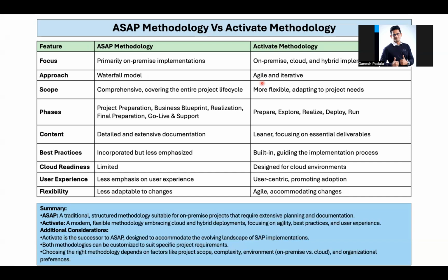Okay, so at a high level, that is how we split the entire operations into phases. Or else, when you have 100 developments, even in waterfall we used to do that. 100 developments means okay, P1, 60, everything should go before go live, and some 25 go live to hypercare, meaning within 2 months after the go live, and the remaining 25 or 10, whatever is pending, can be given within 6 months. So like that also we used to split. That happened in a more systematic way in the agile methodology.